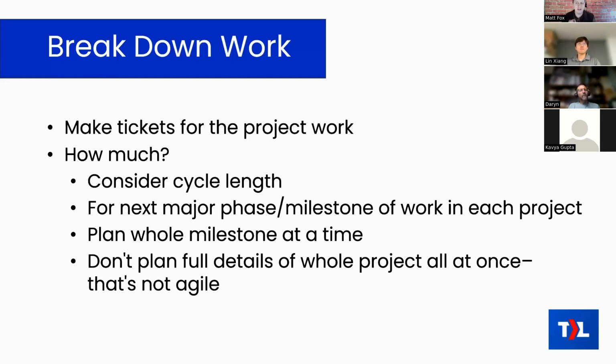A lot of this doesn't really apply for projects that you do over and over, which I should mention, you should do a lot of those. The more projects that you can do over and over, like a standard firewall replacement project, that's great. That is a good way to be really profitable when you get good at it. In that sort of thing, where your project is more of a product because you're doing the same thing over and over, this doesn't really apply. As you become experts on that type of project, you should lay it out in a lot of detail. But then it's not uncertain. So there is a difference in how you should break down work for uncertain one-off projects versus common projects that you do over and over.